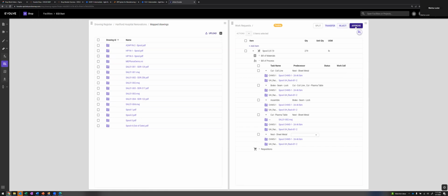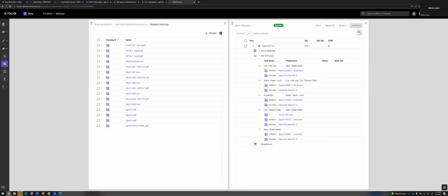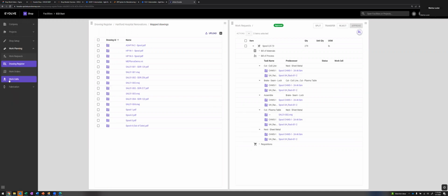At some point, whenever we decide we're ready to commit, just by opening it, we've changed the status to pending, so the field team knows that I'm looking at this. When I hit approve, the status has now been set to approved. The field team gets an email indicating first that I was looking at it, it was pending. Then they get another email indicating that it's been approved. So they're staying informed all along. They can also look at that work request table and see the status of the work request in there. Once I have approved this, a work order has been automatically created.